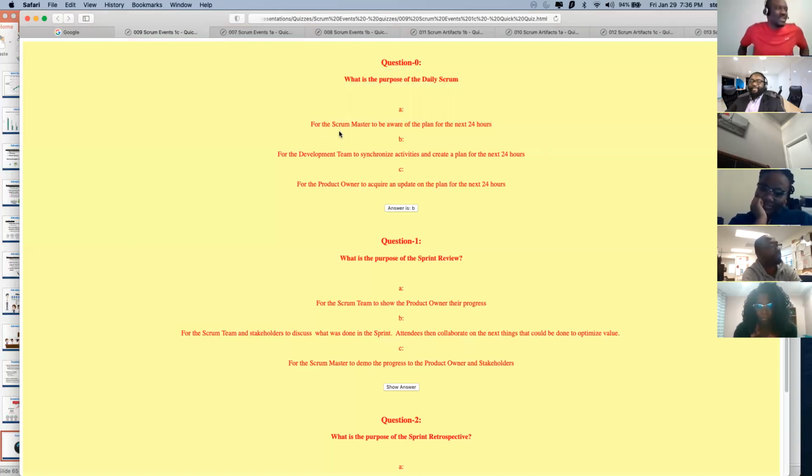Because the Scrum Master and the product owner don't have to attend. That's correct. Not only that, but they're not there to track the plan. The dev team is accountable for tracking their own progress, and the Scrum Master can just show the reports to everyone, if they're managing the Jira dashboard and stuff. But normally the team should be able to do it independently. And the Scrum Master doesn't have to attend the daily stand-up meeting, I should say.